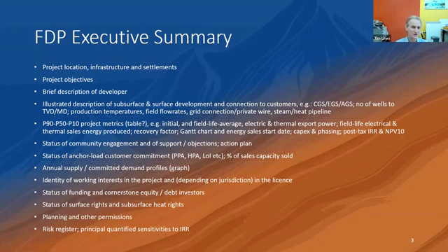I put in things like Gantt charts. It's important that you have a robust understanding of the schedule of the project to first energy, or first heat or electricity, and also the phasing of the capex. That's important when you engage with the equity and the debt, as to how you can de-risk the project for them, because the more you can de-risk it for the equity and the debt, the lower the expectation of rates of return will be from their side.